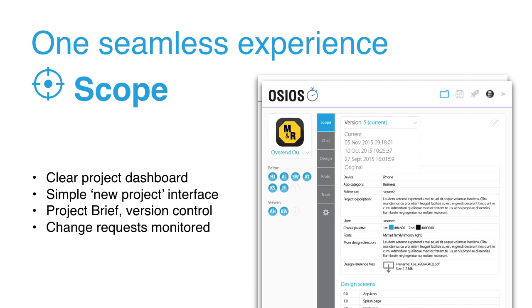It's called development for a reason, right? Things do change, that's the whole point. If you or your client makes a change to the brief, it's shown here, and although it's not on the screen here, it will actually be highlighted in yellow. That way everybody can see what the change is, and everybody can click on the form here and go back to a previous version of the brief. We're currently viewing the current version, but we could go back to a previous state of the brief.